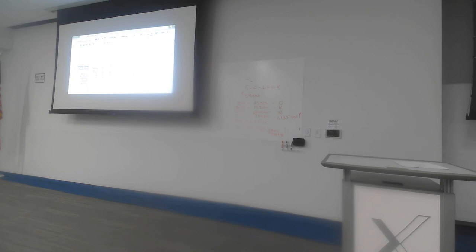J asterisk, J is on all of these different paths, so all of these different numbers here are going to reduce by one. So 15 goes to 14, 14 goes to 13, 14 goes to 13 on that path, 11 goes to 10, and that last path, 15, goes to 14. So I have reduced the overall project duration by one day, because again, those two paths, this path here, and this new critical path here, they're still the two paths with the highest durations. J has been maxed out now. I can't crash it anymore.